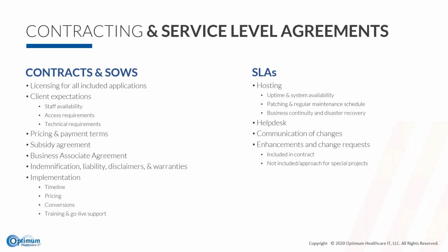So things like application support, support services scope, the requirements from your recipient organization in terms of how will they need to participate in the implementation, what do you need from them from a tech infrastructure standpoint, outlining pricing, and then really starting to outline your implementation approach. So really for both host and recipient, the contract should eliminate any surprise about unexpected costs or scope and what is or is not customizable. It should also start to lay out the implementation approach.